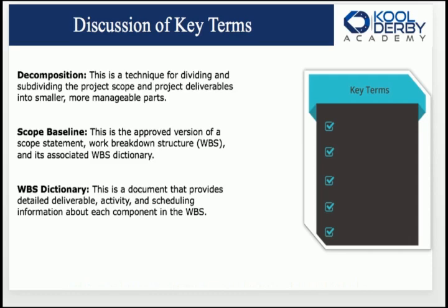And so on. So the WBS dictionary has nothing to do with Webster, okay? It has nothing to do with that. A dictionary is used for each work package in the project. Now, the work packages are the result of the WBS process, the work breakdown structure, and that process is called decomposition. The WBS, you can do what's called top down or bottom up.